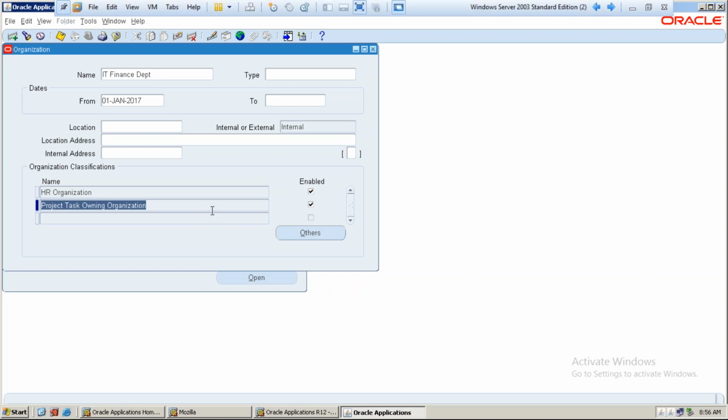Okay. Contract projects are nothing but completely customer projects. If we are doing anything for the customer's purpose, those projects we call contract projects. Here we accrue all the expenditures, and based on your billing terms, we bill the customer. That is what contract projects are.